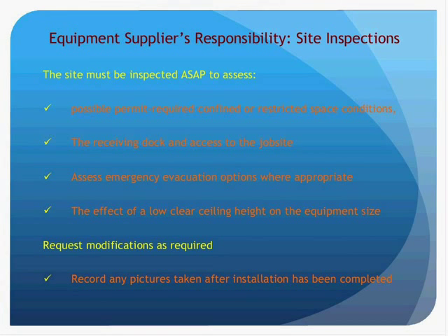Each potential supplier could recommend who will be responsible for the collection and transporting of materials to a central or alternative site for purification. After an equipment order has been received, the selected supplier should revisit the site to describe what modifications, if any, will be required to any location before the equipment arrives at the job site.